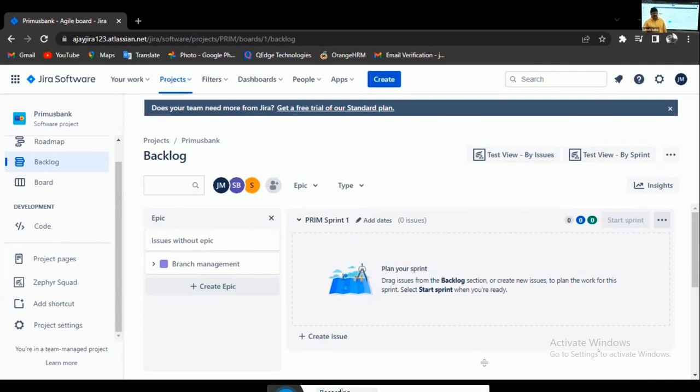It is automatically assigning a serial number, sprint 1. Plan your sprint. There are many epics. Actually, I have only one epic here for our understanding. Actually, a project will have 20, 30, 40 epics, so many stories, so many task items. First, product backlog means everything, a list of items, totally bulk. But we don't plan all in one schedule. Plan your sprint 1, plan your schedule 1. What are all the items you plan to implement in schedule 1 need to be tracked here.